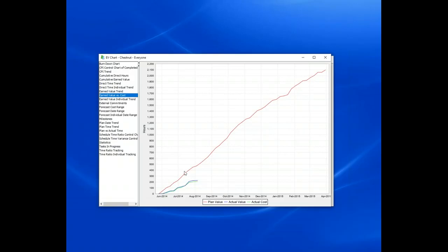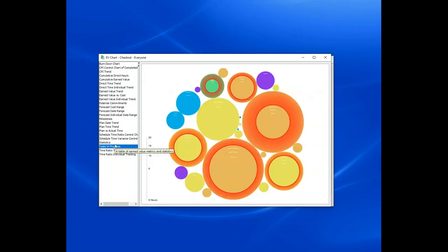So moving right along, the Burnup Chart only gives credit for work that's complete, similar to what is done in an Agile tool. So it doesn't give us insight into tasks in progress. It's important for us to track that. And as with Agile tools, the dashboard does provide a Kanban chart in another place for tracking in progress work. But it also provides this visualization, which many teams find more useful.